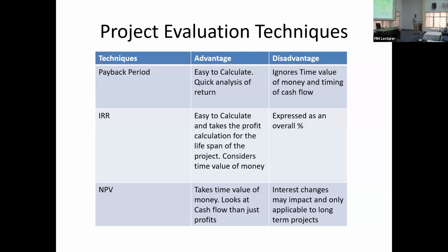Interest rate changes over time. Every month in Sri Lanka, right? Every year it is going to change. First problem. Second problem, he puts a sale value at the end. What do you call it, scrap value, right? You all call it scrap value.